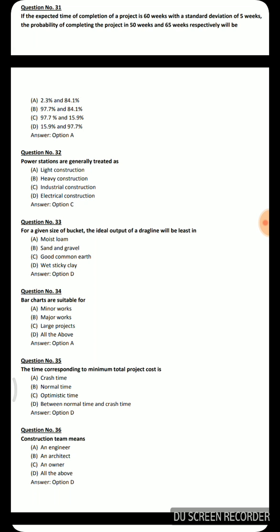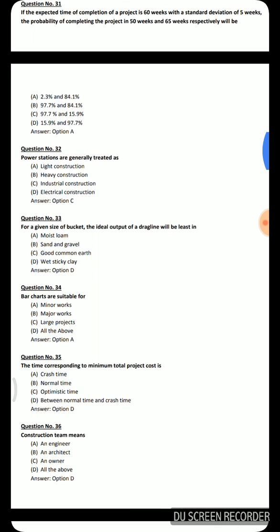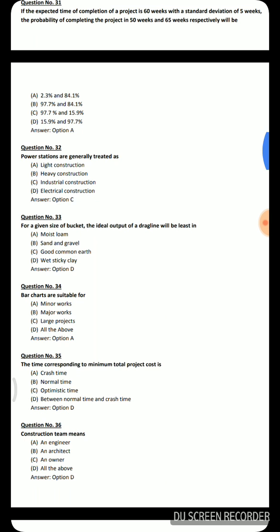Next question: For a given size of bucket, the ideal output of a dragline will be least in — moist loam, sand and gravel, good common earth, or wet sticky clay. The correct answer is option D: wet sticky clay. Next question: Bar charts are suitable for — minor works, major works, large projects, or all of the above. The correct answer is all of the above.